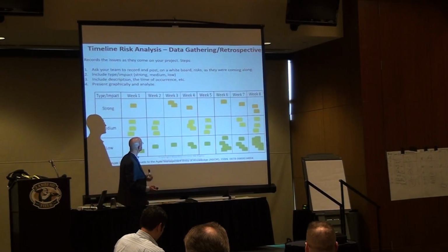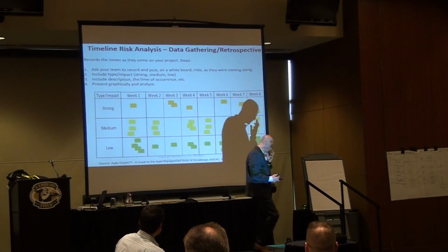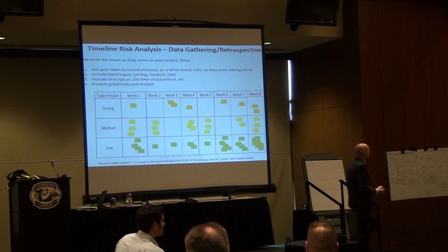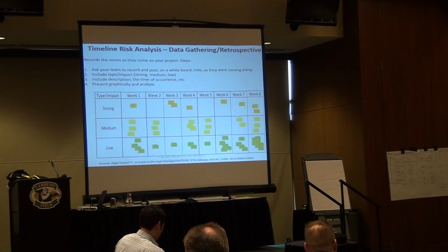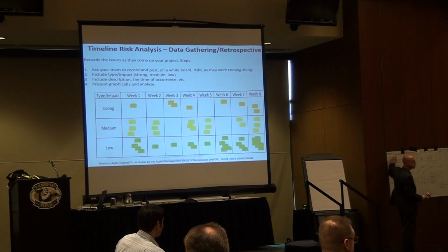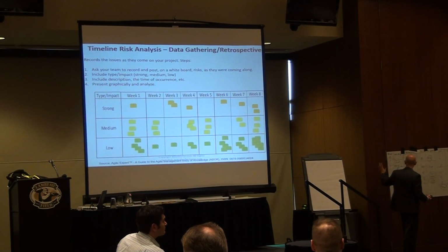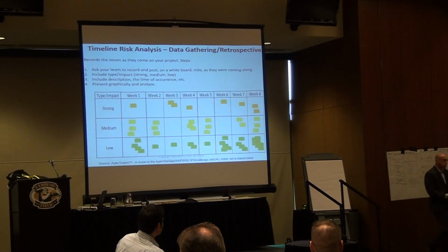Another tool that I like to use is a timeline. Basically, you project within a given time period how much risk occurred. This is on a wall, usually in a common area. You put up a flip chart, and team members come and stick a note if they have an issue. They say, this week I have the following issue. So you create an information radiator area. People come and inform themselves on their own time about what's going on within the project. You don't need to pull them into a meeting and ask what's going on. They can just put it on the post, and people can pass by and learn about the project.